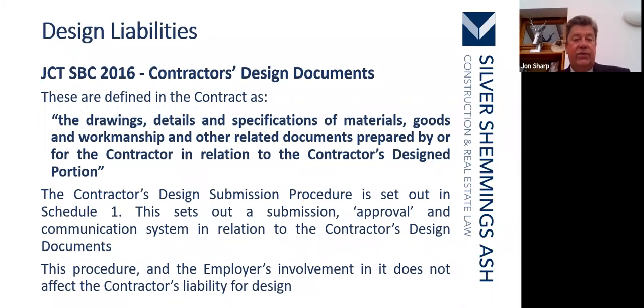JCT SBC 2016 contractor's design documents. These are defined in the contract as the drawings, details and specifications of materials, goods and workmanship and other related documents prepared by or for the contractor in relation to the contractor's design portion. The contractor's design submission procedure is set out in Schedule 1. It sets out a submission, approval and communication system in relation to the contractor's design documents.